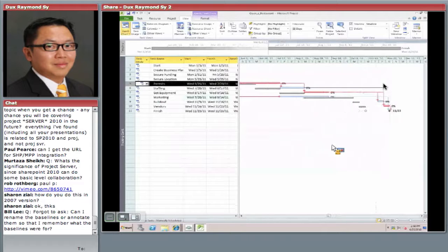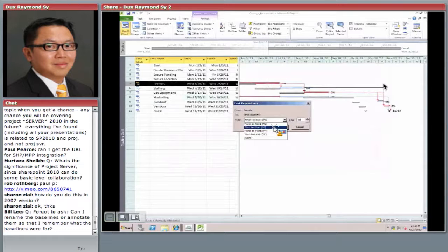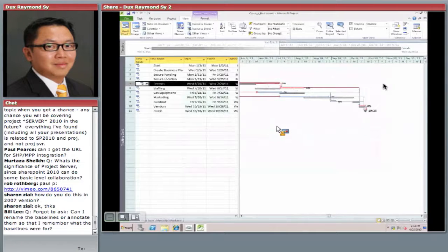So when I click on OK, all right, it looks like I still didn't save much time. I said I can start permit and start marketing at the same time. Now, what about this other task? In fact, I'm going to do that for everything. Two days after acquiring the permit, I'm going to start getting equipment. That might help. Oh, wow, that helped actually.